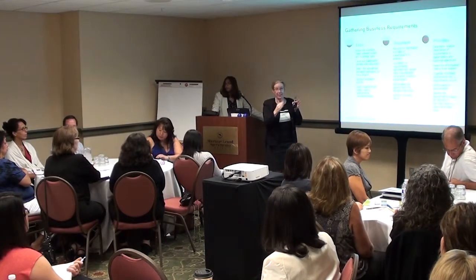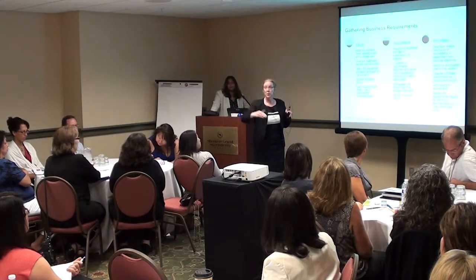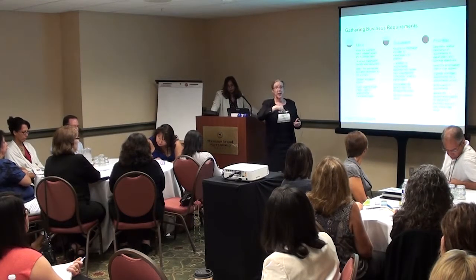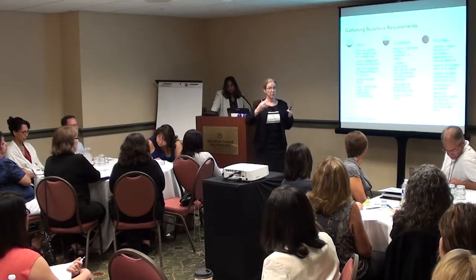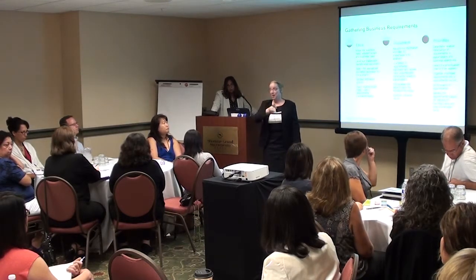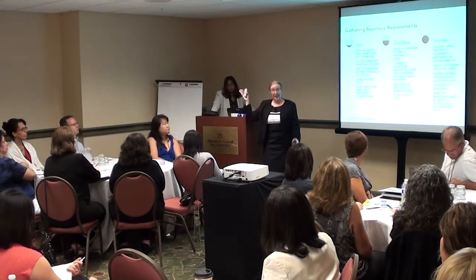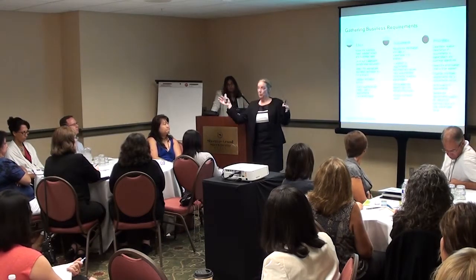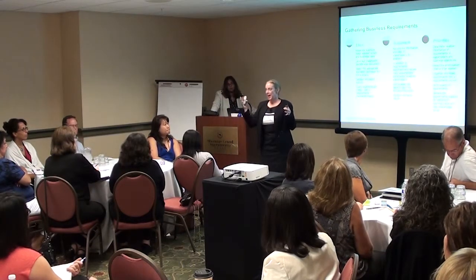And then have periods in your project where you actually revisit it and say, where are we? What's our timeline? Are there things we're going to have? That's why I like that must-have, should-have. Everything that's not a must-have can go. When you first start, maybe you can do must-haves, should-haves, and could-haves. But as time goes on, the could-haves go away. There's something we're going to do later on after we've gone live and everybody has survived.